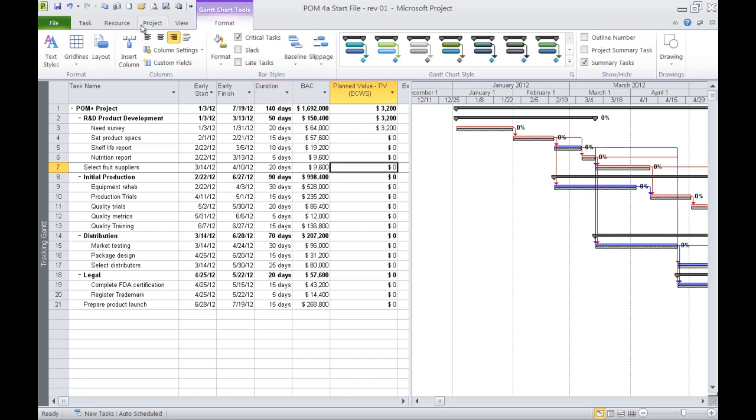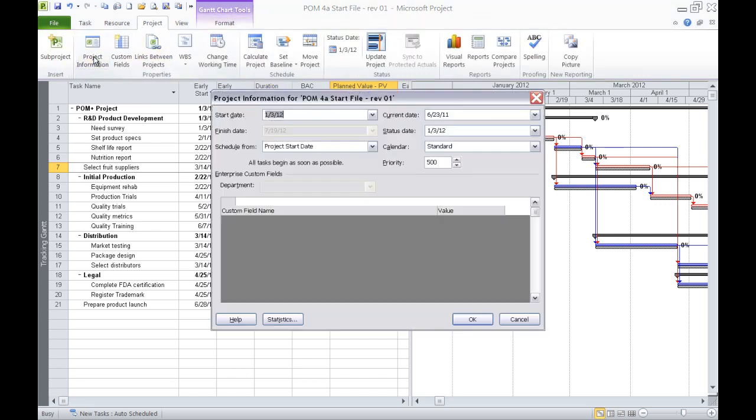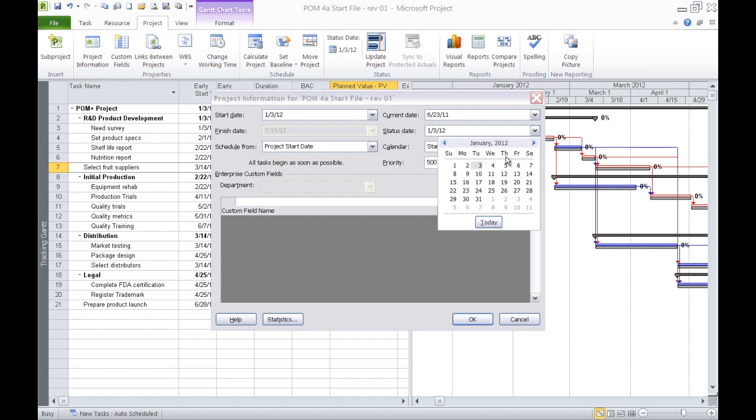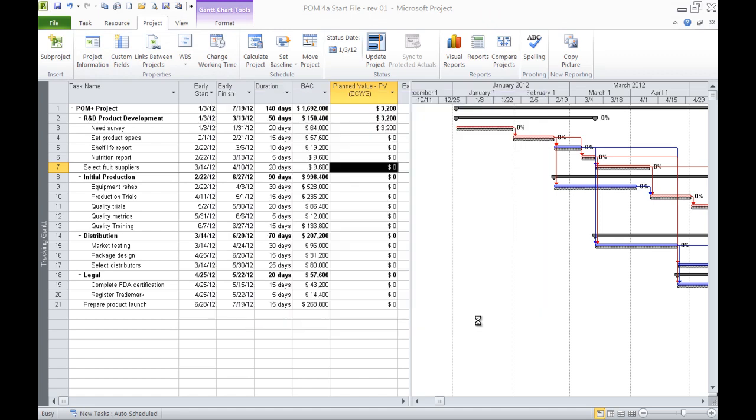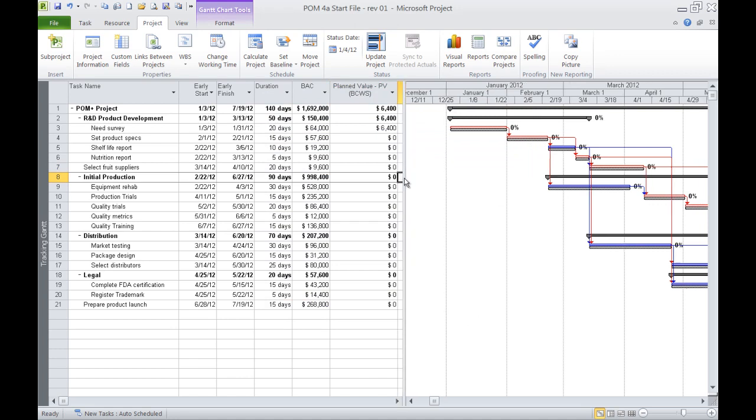Let's do one more thing. We're going to take this project and we're going to take this not to 1 day, but to 2 days. And when we do that, that makes the numbers just a little bit easier to look at, in that as we evaluate our earned value concept, we understand that after 2 days, or 10% of the task rather, we had planned to finish 10%, and that would have been 10% of our original budgeted cost.